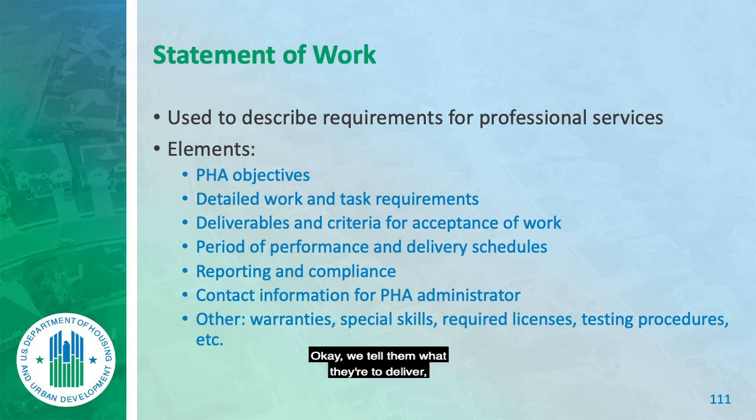Okay, we tell them what they're to deliver, what the criteria is for acceptable work. I just gave you the 5 things that they're going to do and I'm going to check on them. You always have to put in time frames. This lady did this landscaping bid and she goes, cut the lawns as needed. And I said, no, that's way too broad. We usually do weekly cuts every 7 days. She goes, well, my boss said as needed. They know how often to do them.